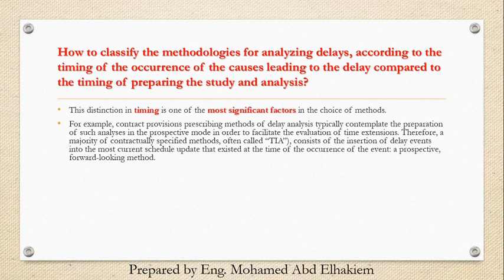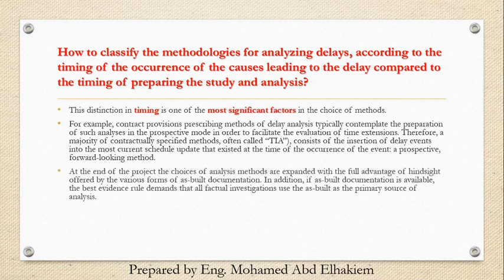Therefore, the majority of contractually specified methods, often called DIA, consists of the insertion of delay events into the most current schedule update that existed at the time of the occurrence of the event — a prospective, forward-looking method. At the end of the project, the choices of analysis methods are expanded with the full advantage of hindsight offered by the various forms of as-built documentation.